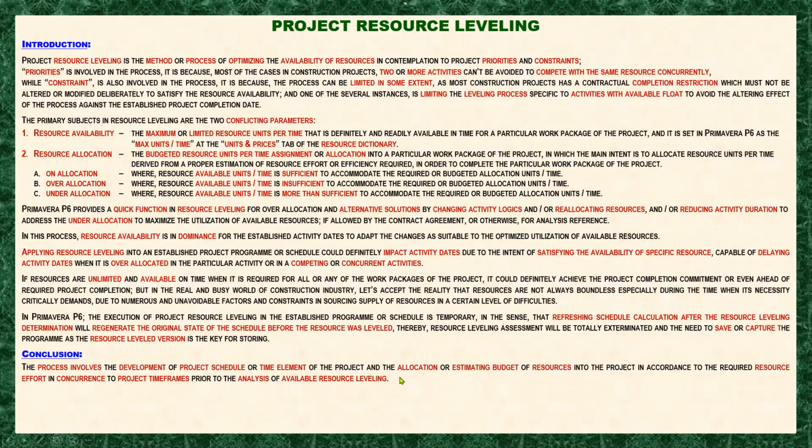So the process is that you first develop the schedule, fixing and finalizing the time, and then you estimate your resources to be allocated in each activity of your project.